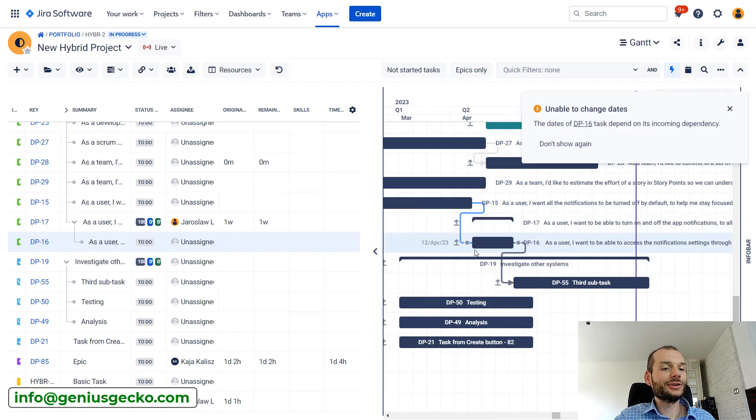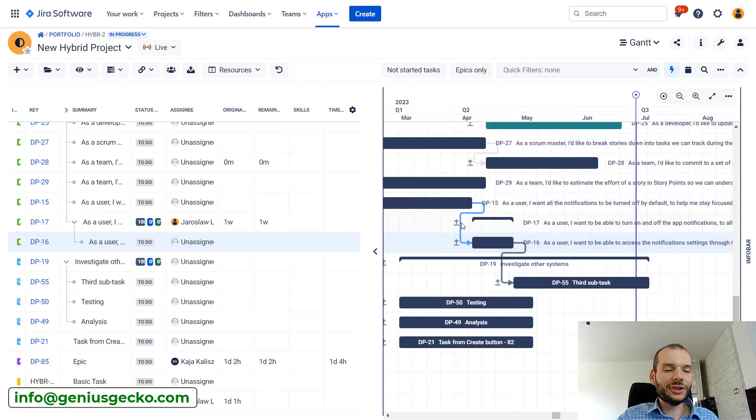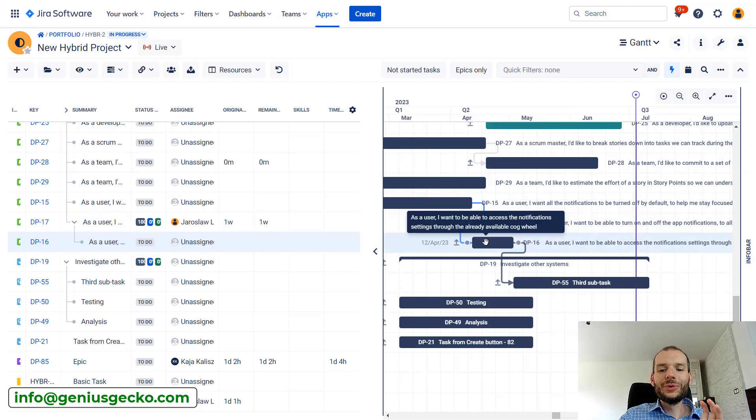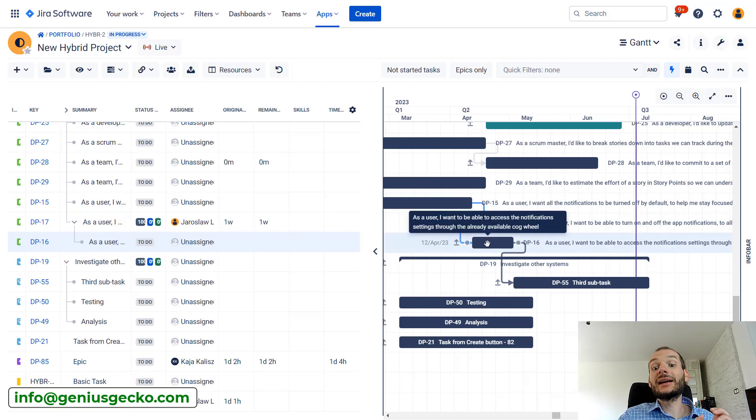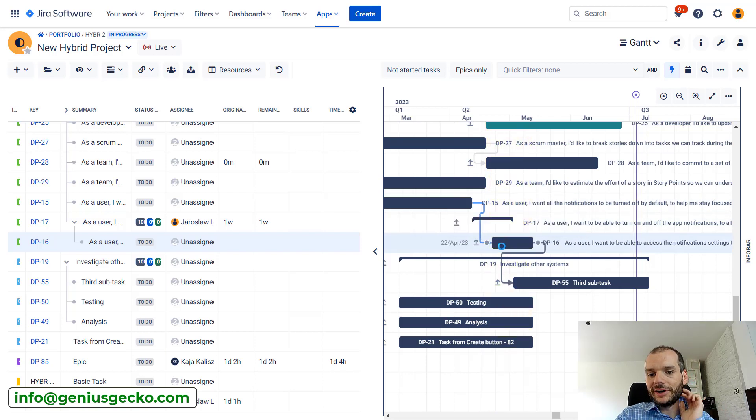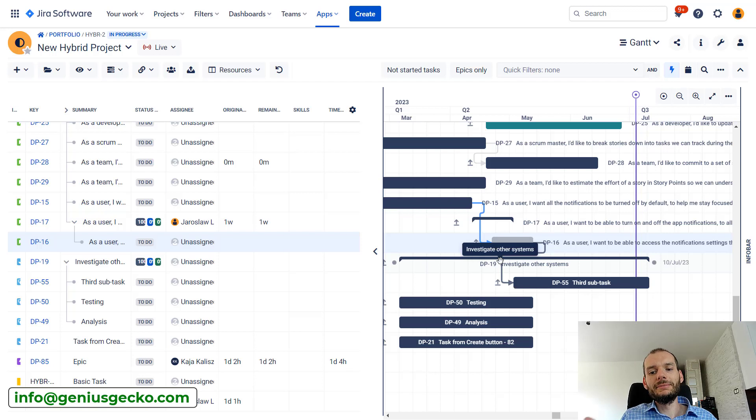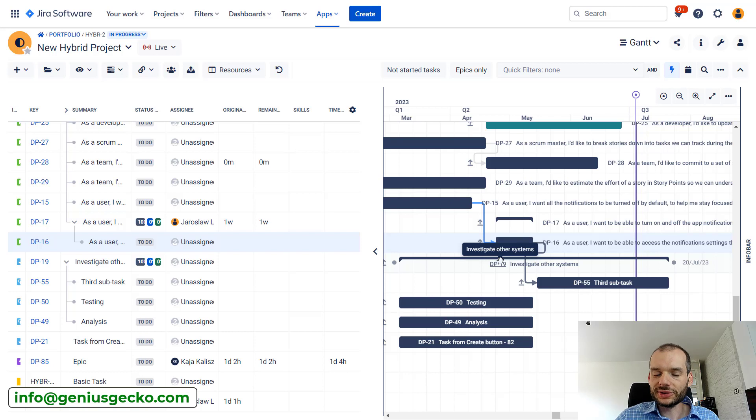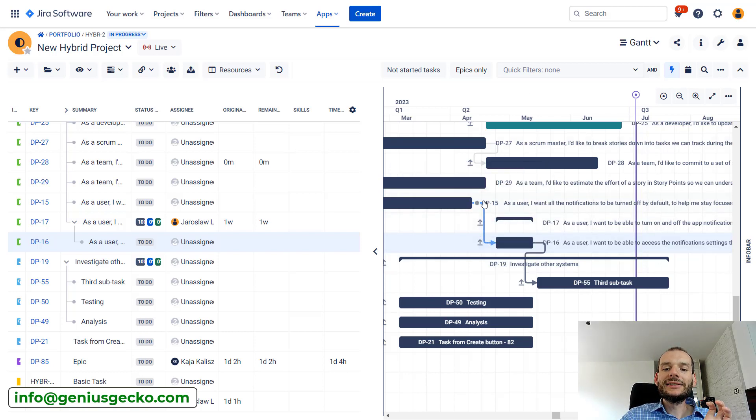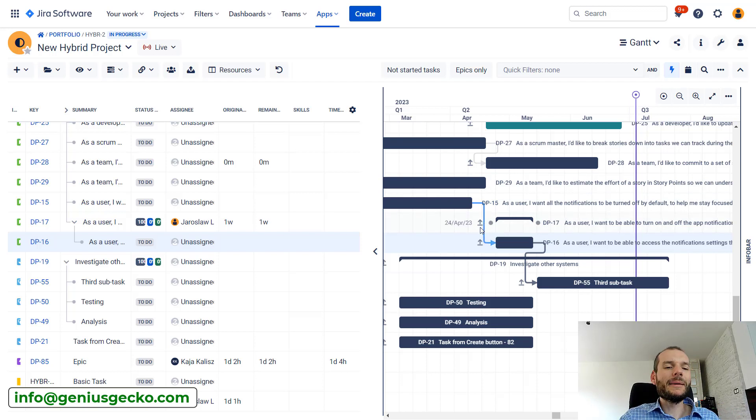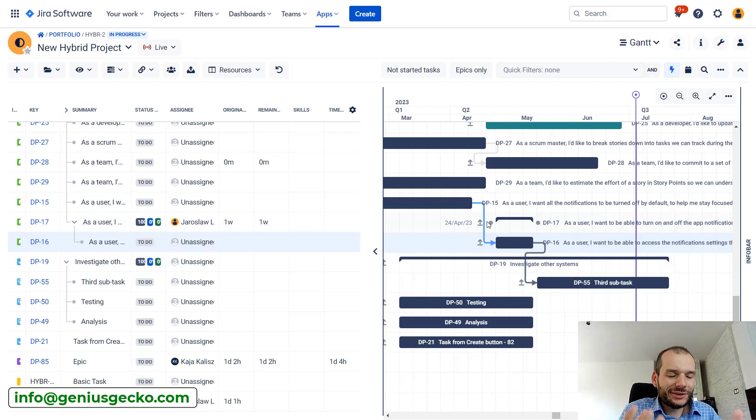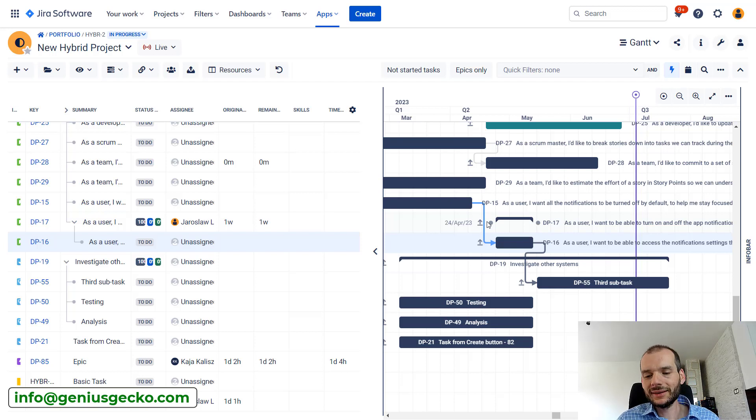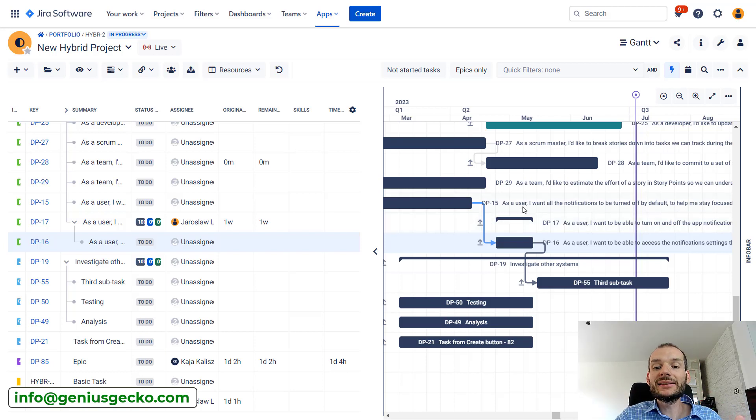With non-ASAP mode, all the following tasks won't be pulled in. And maybe this is a good thing, maybe this is what you want, because moving tasks around and pulling them over here when it was not planned may impact negatively your resources. For example, the workload is nicely spread across resources. If this task would be automatically moved suddenly, the person responsible for this task will be over-allocated.